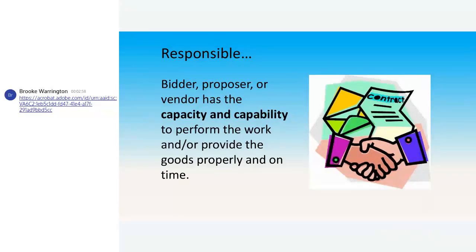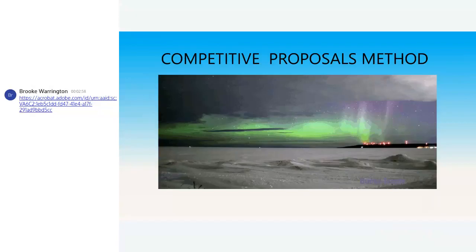You could be building 10 or 15 unit projects and have a contractor that you have used that does wonderful things. They're on time, but now you're bidding one for 100 units. The chances that they can bid on that and be found responsible is going to be rare. They might not have the banking and the financial ability. They might not have the size of the workforce. They might not have a lot of the requirements, the tools to build to your size and timeline, to go from a small project to a great big one like that. So that's what you'll run into a lot.